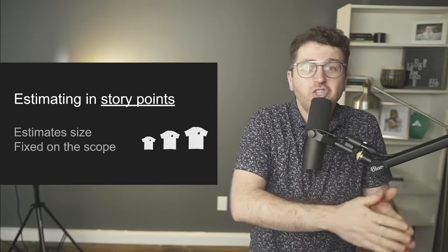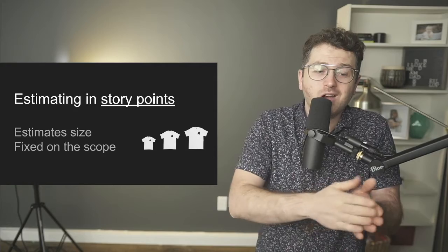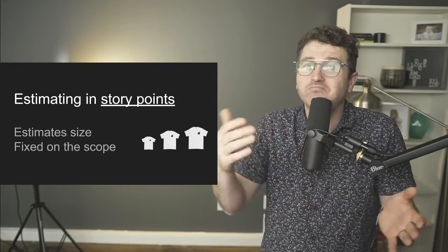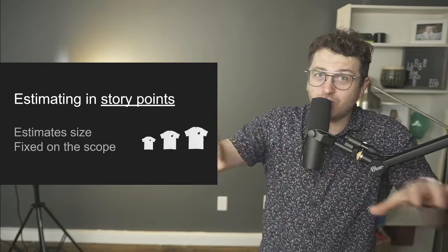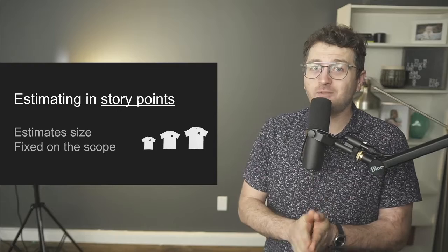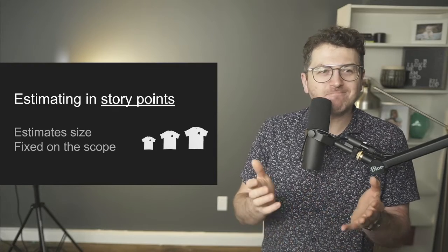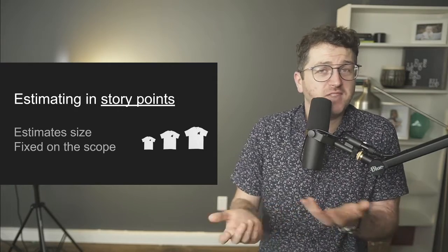Now, usually the estimations that are being used by developer teams for stories in story points are between 1 and 8. If it's bigger than that, it usually means that it can be broken down into features that are, again, between 1 and 8. I know it takes a little bit of time to get used to this, but philosophically, it's kind of easy. It's just the size. What's bigger than the other one?